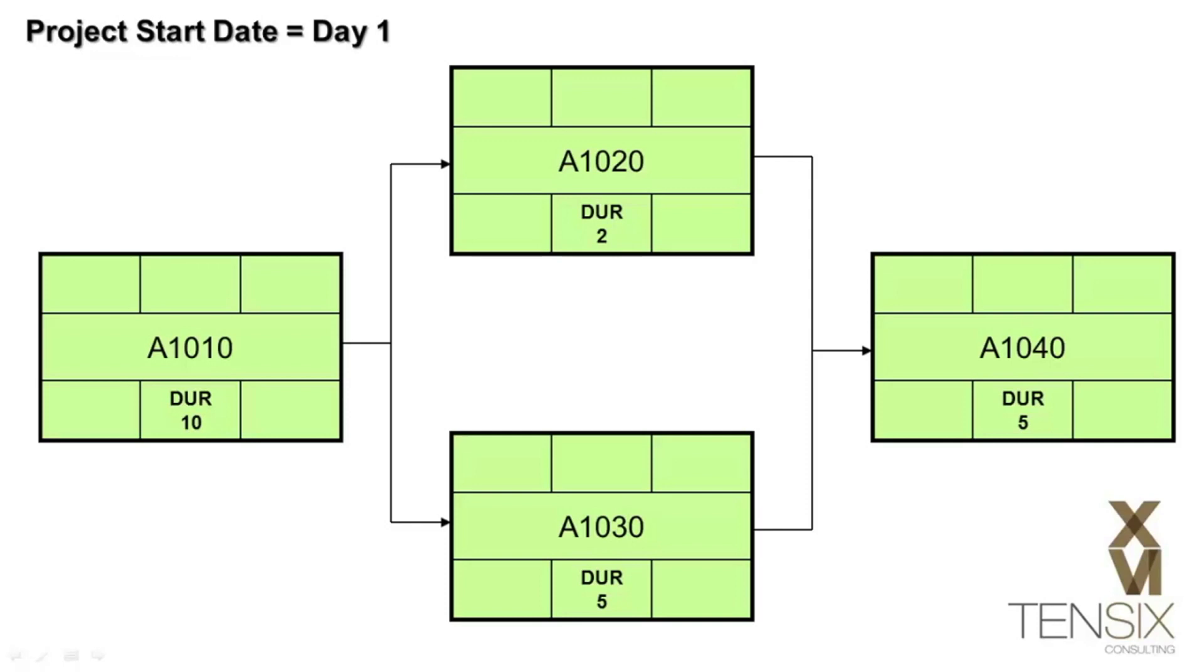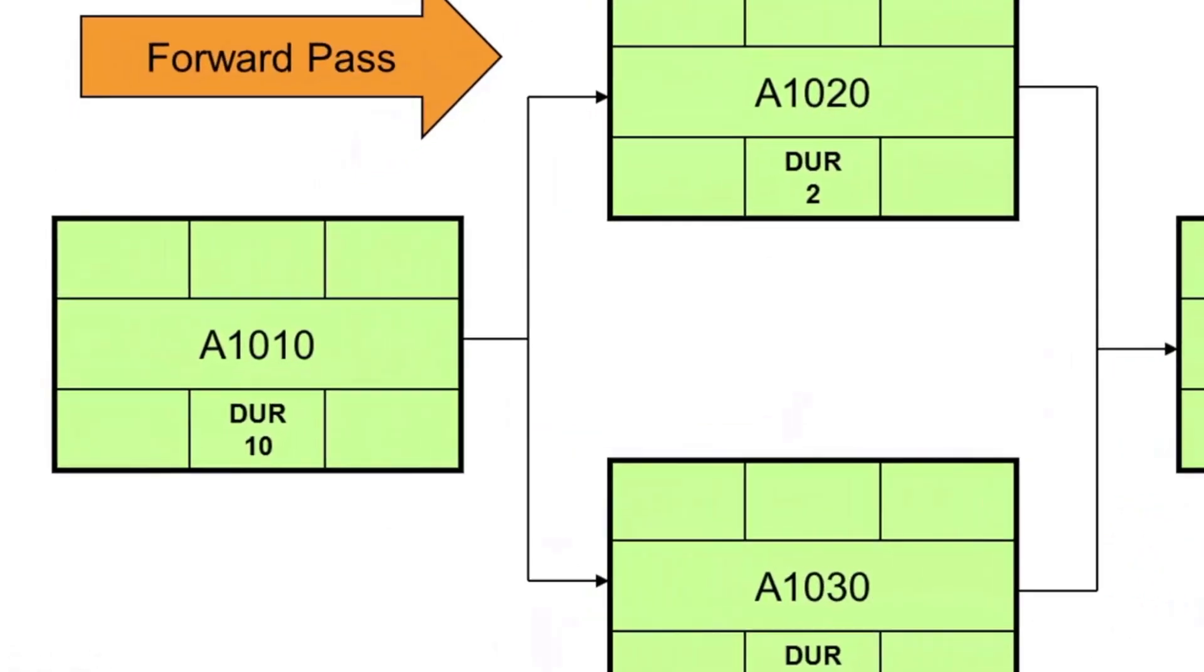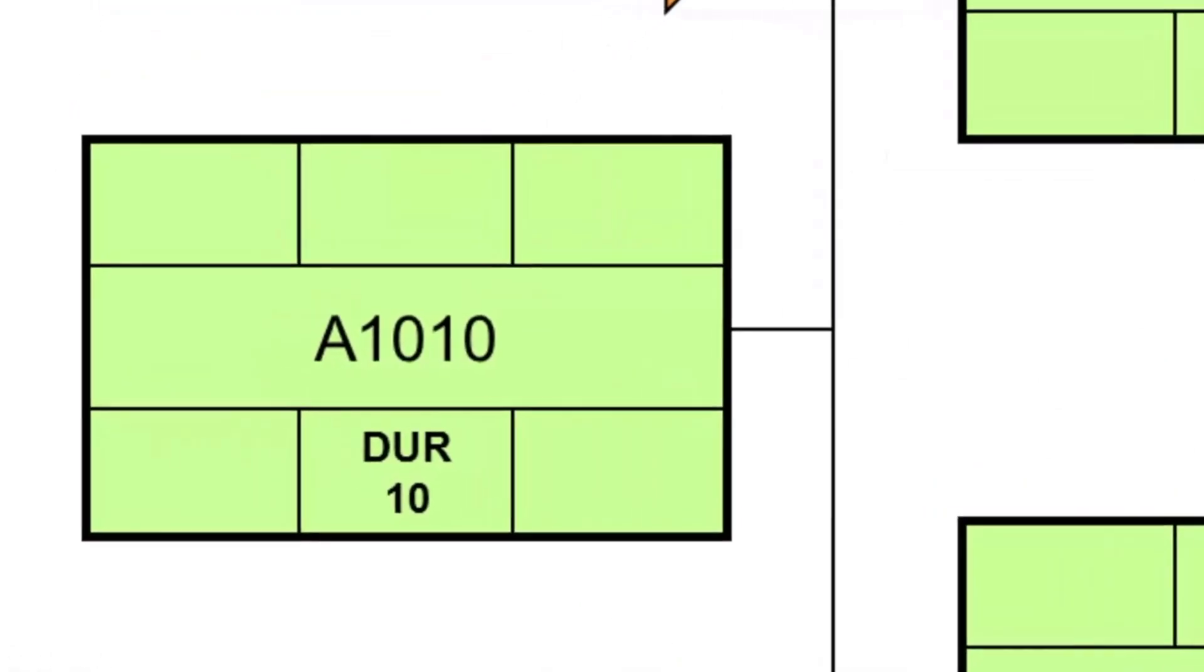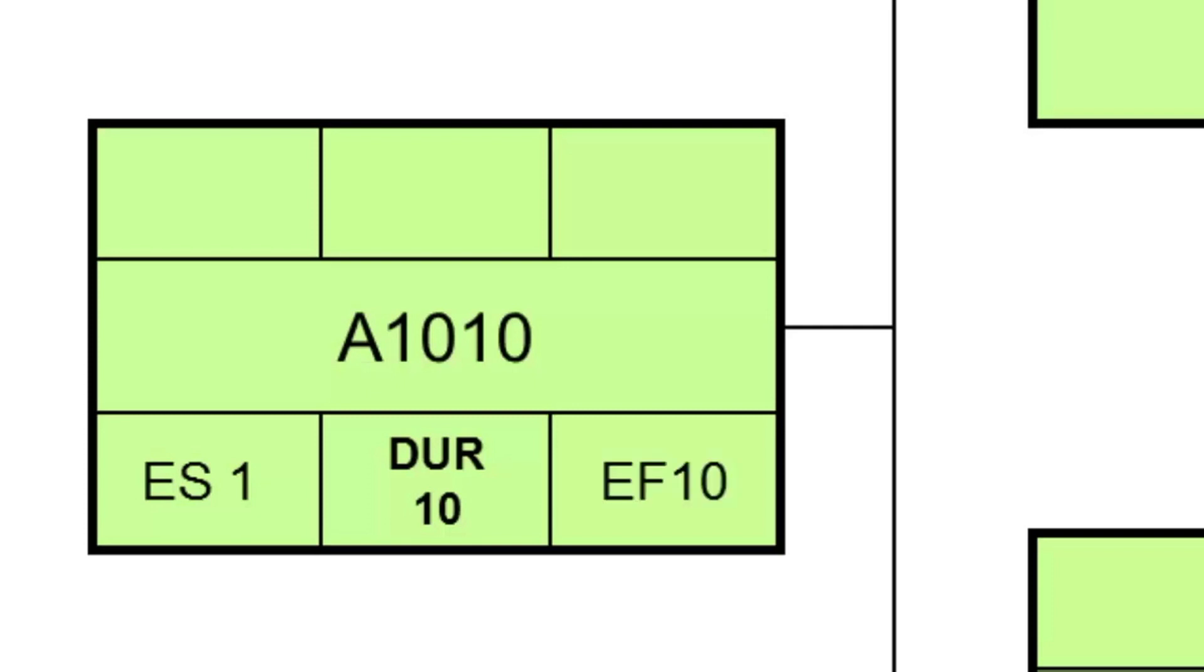The first step is to perform a forward pass through the network, which will generate the early dates for each activity. An early date is simply the earliest date on which the activity can start, based on its relationship to other activities. Starting on day 1, and assuming every day is a working day, activity A1010 has an early start date of 1. The activity is 10 days long, so the early finish date will be 10. That's day 1 plus the duration, 10, minus 1.